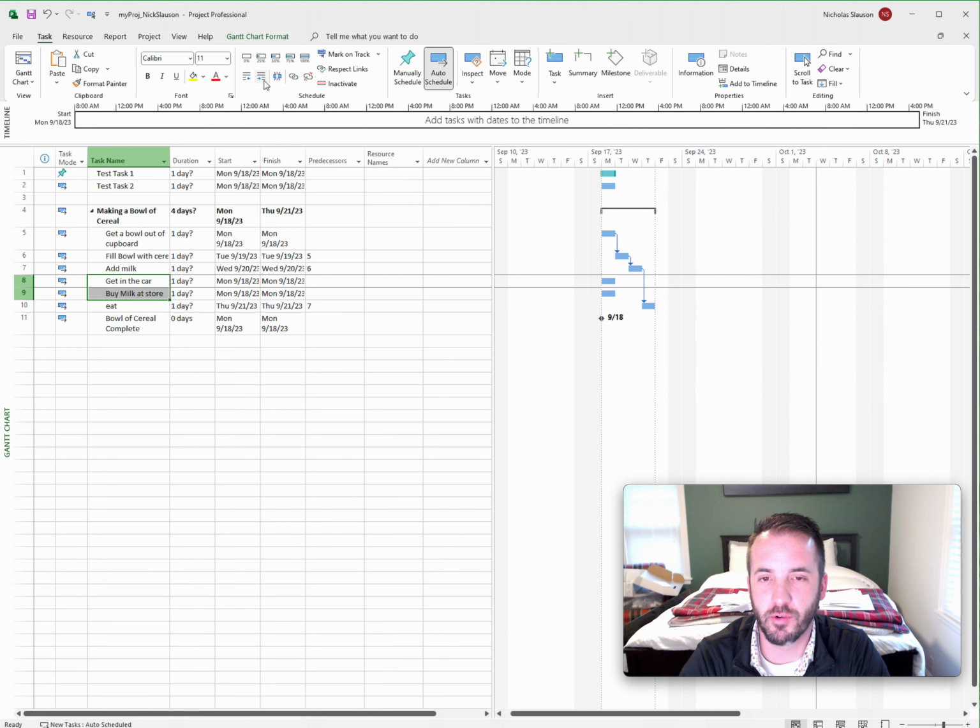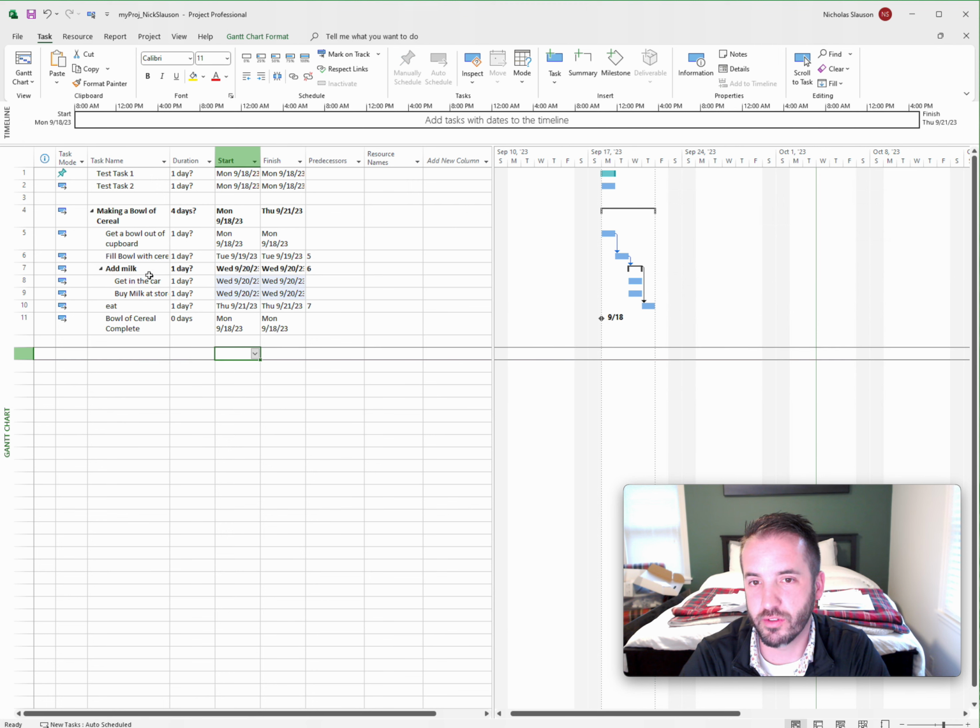And we need to summarize those. You'll notice those then become sub items of that milk level up there. So you can create a couple different layers of tasks, and what this is doing is creating your work breakdown structure for your project.